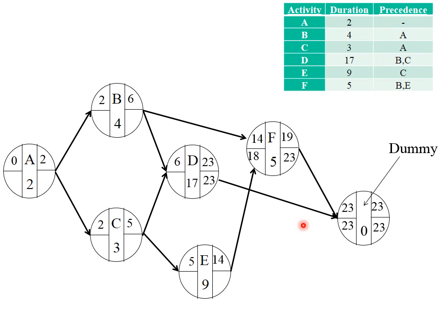You must finish F by 23, so you must begin this latest by 18. D must be started latest by 6. E must be finished by 18 at the latest and started latest by 9. B, you have a choice of 6 and 18. You will select the smaller number working backward. B must finish latest by 6 and start by 2. But C, you again have a choice of 6 and 9. So the smallest number is 6.